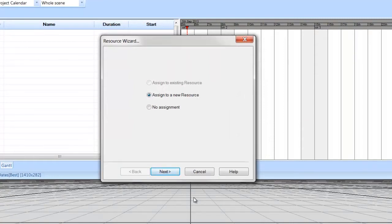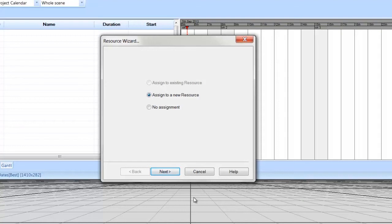When 3D objects are imported into Synchro, they are just 3D representations that can be viewed and manipulated in the 3D window. In order for 3D geometries to be linked to the project schedule, they must be assigned to resources. These should be considered 3D resources, which can be, in essence, a copy of the object name or several objects grouped together as one 3D resource.